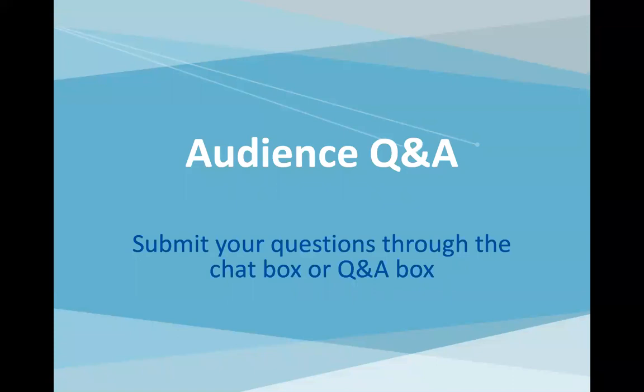Well, this is Chip. I'll maybe start with that one because we've had some comments about it, but also let me say thanks to our panelists. I thought you guys did a terrific job and it's evident so much work went into achieving what you've simplified in your presentation. In terms of simplifying the contracting process, what I have heard consistently from all sites is that for large sponsors, when you can achieve a master agreement and put those in place, that saves an enormous amount of time as individual studies come up. And so I've come across a number of sites who have 4, 5, 6, 7, 8 master clinical trial agreements that get established over 2 or 3 years.